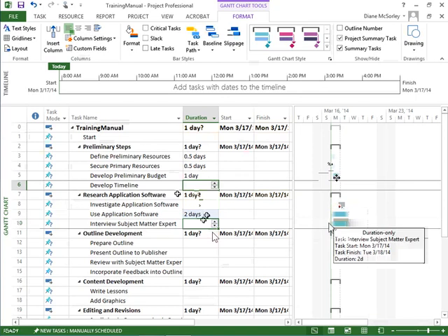Right now we haven't told it how the tasks relate to each other. So Project puts them all in. They all start on the same day. So the 4 days is from the earliest start date. They all start on the same day. The finish is the latest finish date. And that's 4 days, so it thinks the entire phase is 4 days. You'll see once we link the tasks together in another lesson that this will change and display a more accurate representation of total days.